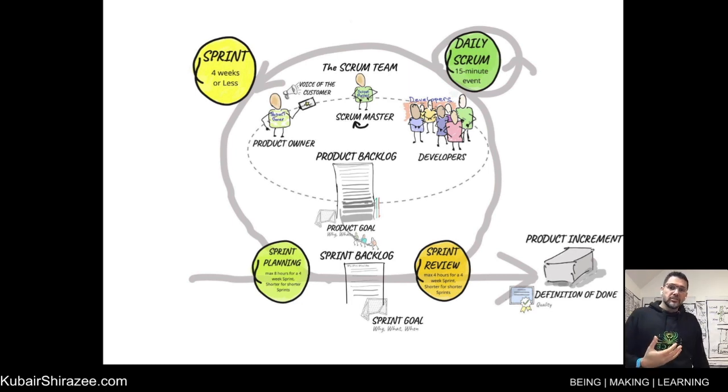Now, during the sprint review, as stakeholders and other participants see the product increment, and with that, they see the evolving product, they might have feedback to share, which may go back into the product backlog for consideration for next or future sprints. Now, the sprint review is time boxed to a maximum of 4 hours for a 1-month sprint.